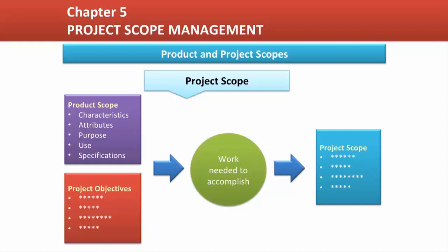Because the project scope will drive what activities occur, it must describe in great detail and without any chance of misinterpretation how and in what steps the deliverables will be produced. Without a well-defined project scope and the controlling processes to protect it from unmanaged changes, the project is likely to encounter scope creep, changes that have a way of working themselves into a project that blow its schedule and budget.